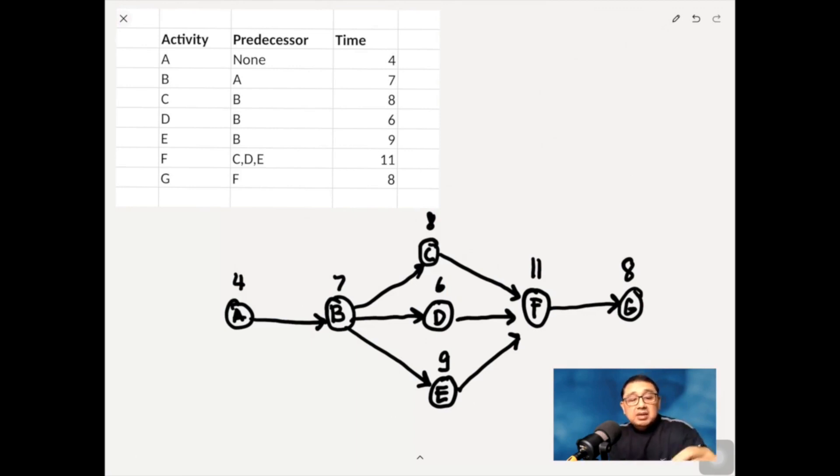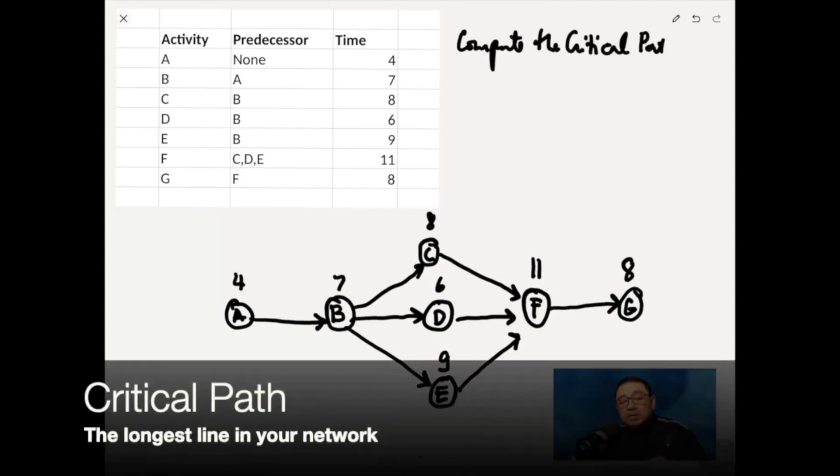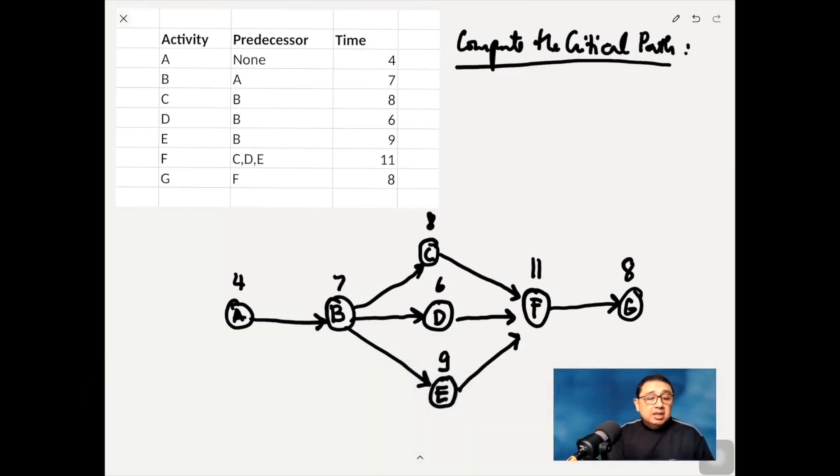Now what we want to do is now compute for the critical path. And how do we do this? So when we compute for the critical path, we actually try to solve all the possible routes from A to G. And so one way to look at it is to move from left to right, then top to bottom.